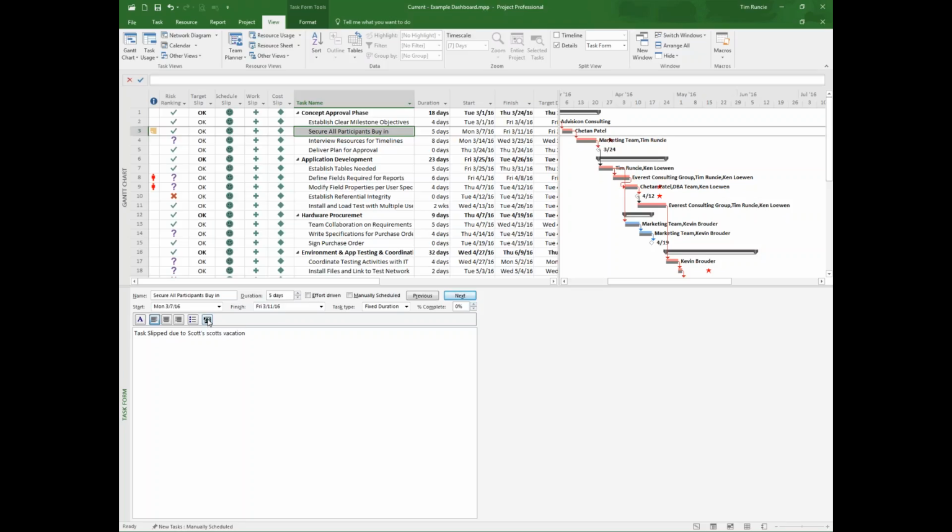And while it makes sense because when you look at the notes, it'll actually surface that graphic, what ends up happening in projects is it kind of overloads the file, meaning that if you stick a Microsoft Access database in here, you're going to have the size of the Access database embedded inside of the Microsoft project schedule. And this tends to create problems.